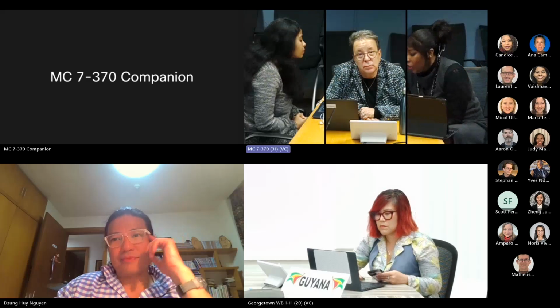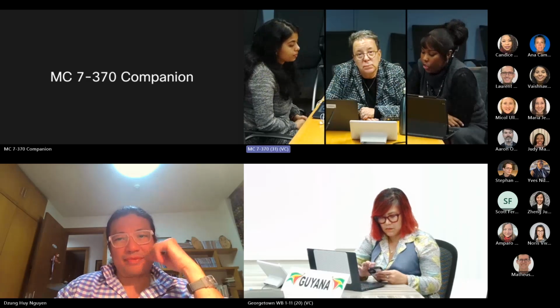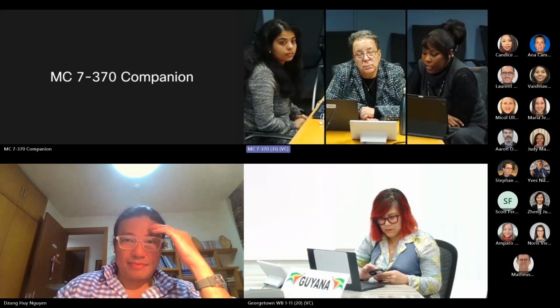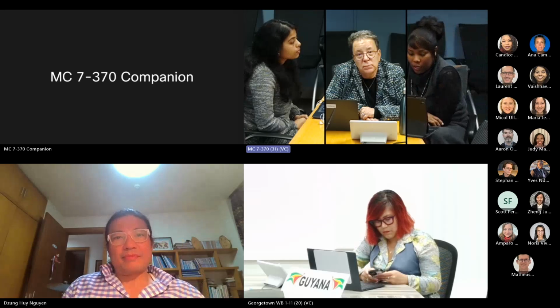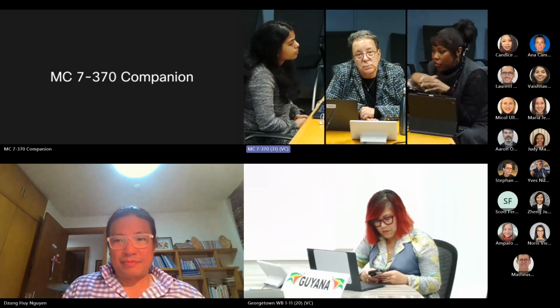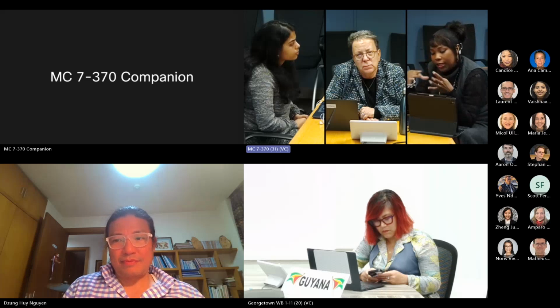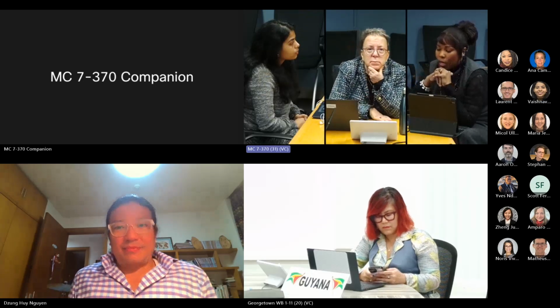Thanks, Julie. So at the pre-feasibility stage, under the flood risk framework contract arrangement with JBA, data was collected more or less at the global level, with the exception of LIDAR. So we specifically conducted a LIDAR survey for the purpose of developing a digital terrain model for the site, for the geographic area of influence in terms of the project geographic scope.